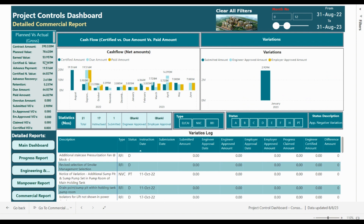On the left side this is a full analysis of the commercial report: contract amount, planned value, earned value, certified gross value, advanced payment, retention, due amount, and the paid amount, including any overdue amount or variations. For the variations, we have 21 total submitted — 17 instructed and 1 submitted — meaning we have 4 potential variations, perhaps from comments received on shop drawings or replies to RFIs. This is the full variation log for the project.